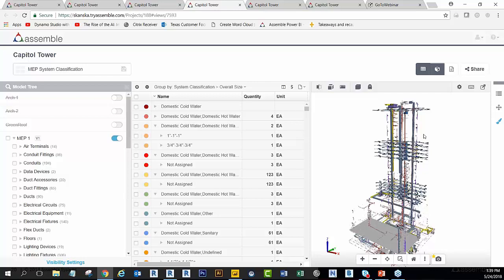And so in order to get your accurate model-based takeoff, you need to be aware of what's being modeled and what's not. Then, once I get that information per level, you can extrapolate and use that information to get your totals.